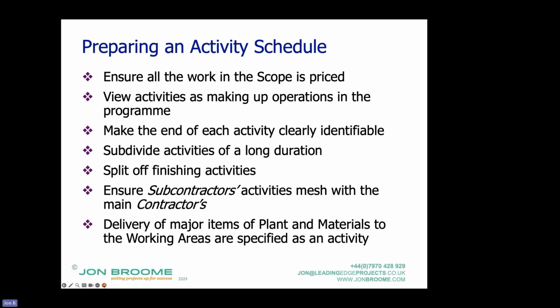So it's in the contractor's interest to give a good activity schedule. And if you're evaluating an activity schedule at tender and you like the overall price and the contractor, you might say, but we have concerns that we might have arguments over whether an activity is completed. So the activities we have concerns over are these. It's not an excuse to change the overall prices or bring forward cash flow, but can you tighten up on those descriptions?